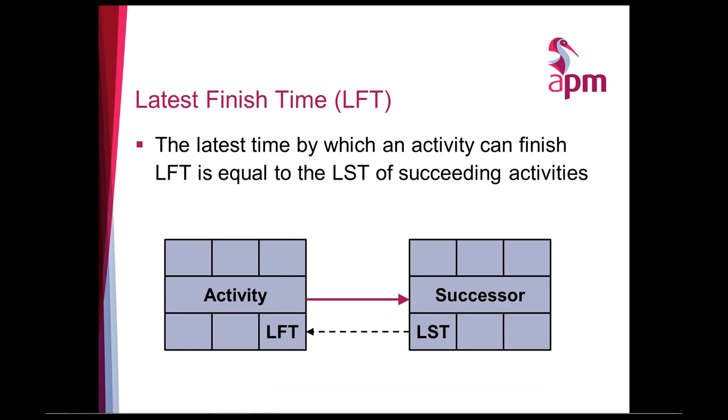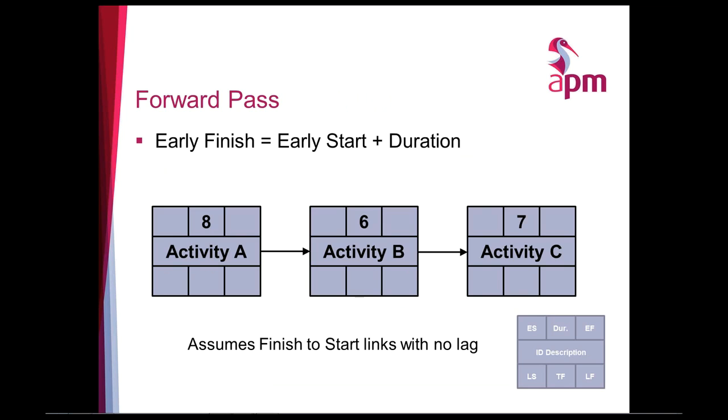And the latest finish time is equal to the latest start time of the successor. Now, this might seem really complicated, but it will become clear. So I've got a little example of how we do this.